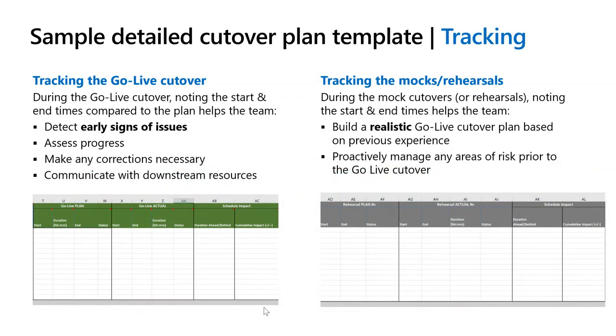These two sections are essentially just a continuation of that spreadsheet that we started, where you are tracking the start time, end time, and duration of each of the steps during your mocks and your rehearsals. The reason you're doing that is because you're building up a realistic plan for how long it's actually going to take you when you go live in production. And don't make assumptions.